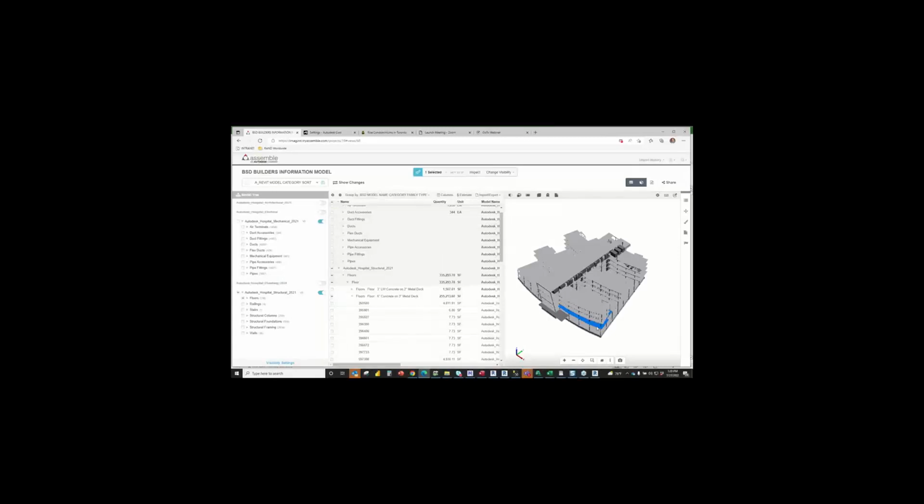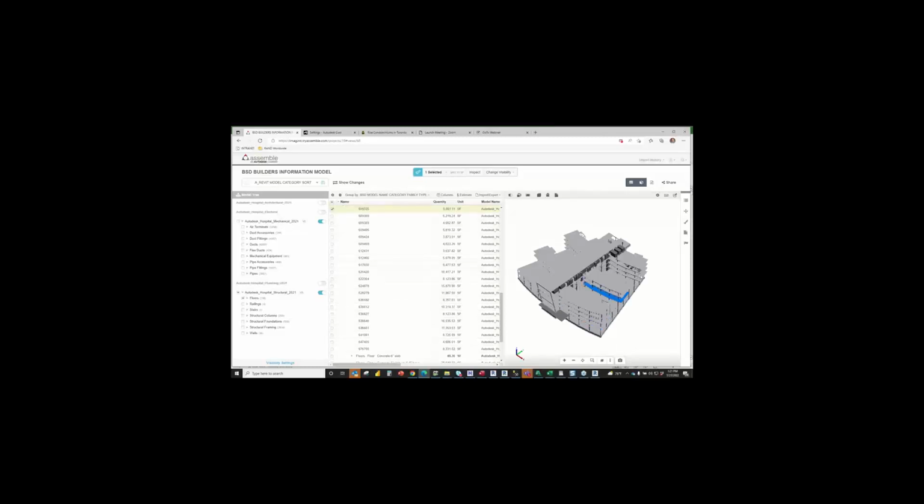So I've selected a segment of that slab that I took responsibility for slicing, because I want to be able to make that pour, and so on and so forth. Whereas these were really full contiguous one-piece elements per floor when I received the model.